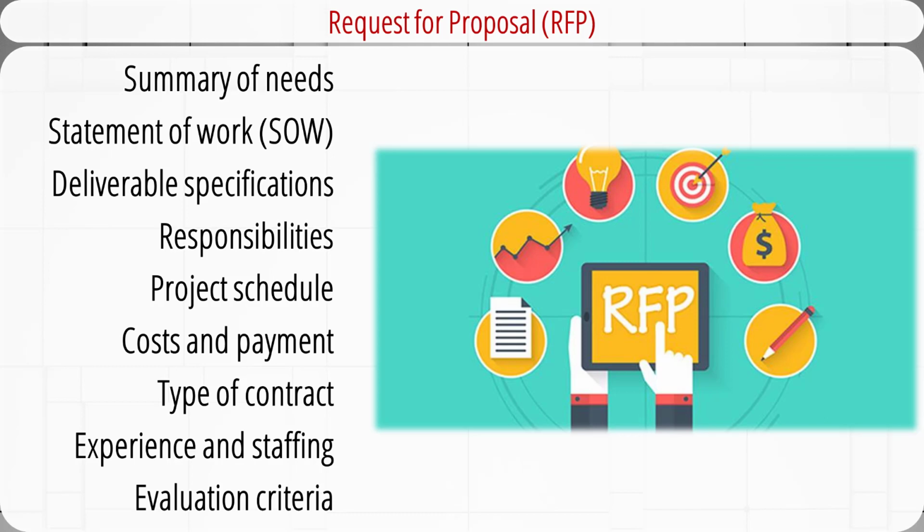Once an organization decides to outsource project work, the project sponsor or project manager is responsible for developing a request for proposal, RFP. The responsible project manager will require input from all stakeholders connected to the activities covered in the RFP. The RFP will be announced to external contractors, vendors with adequate experience to implement the project. The most common error is to offer an RFP that lacks sufficient detail. This typically results in conflict issues, misunderstandings, legal claims, and ultimately, a dissatisfied customer.